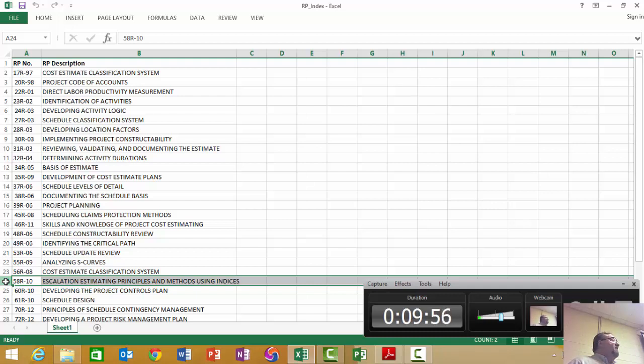He's covering himself. He's giving you a price, which becomes your cost, but he's not keeping it static for the duration of the project, which is smart, because he's going to have variations in material costs, and they're typically upward, not downward. Escalation can also mean you escalate the total price of the project, especially if it's of long duration.